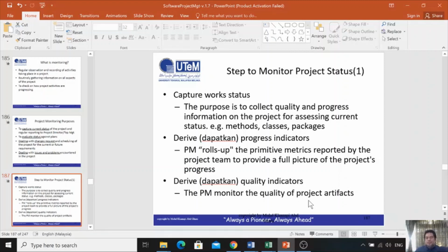For example, project plan. Then what is the deliverable? The SDP, the SDP review, the SDP version 1, version 2. And then another directory you create is software requirement analysis. Under software requirement analysis, you expect that the software requirement analysis report is there, and all the review reports and comment reports from the user.